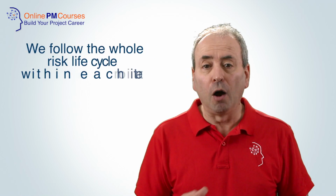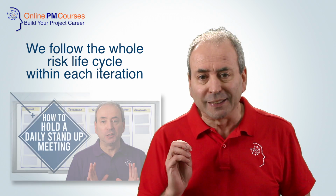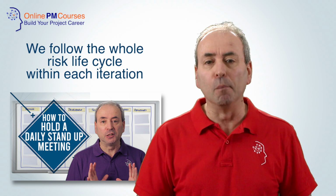The second main difference is that we follow the whole risk cycle within each iteration or sprint or cycle of our product delivery. This increases the team's focus on risk, and of course, because of the way that Agile uses small teams with high levels of communication and collaboration, this means you get a further enhanced focus on risk, which can be enhanced even more by discussing risks at each morning stand-up.